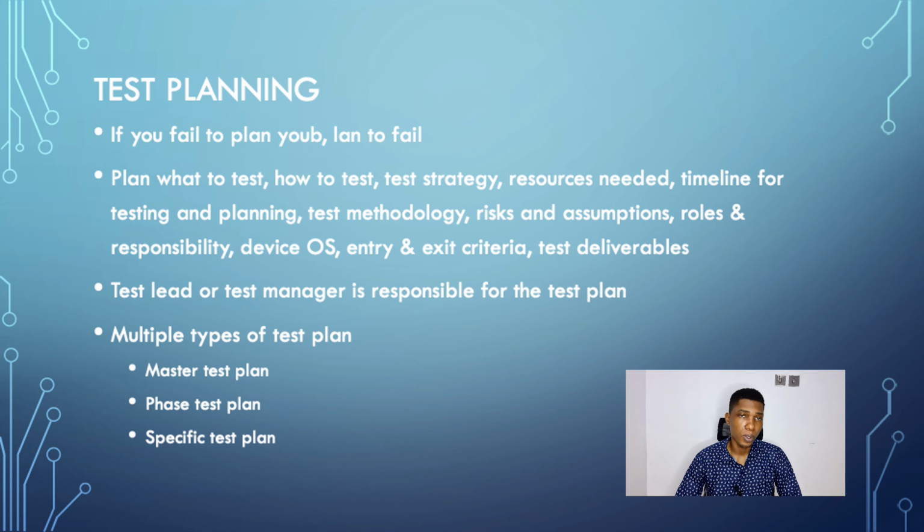Of course, for a test plan to be accurate, for a test plan to be comprehensive, it needs to contain some information, right? It needs to contain information of, first, the objective of the test plan. What are you looking to achieve? The scope. What's the scope of work? You're going to detail it in that test plan. What is going to be tested? What is not going to be tested? It's going to be detailed, so you don't have scope creep.